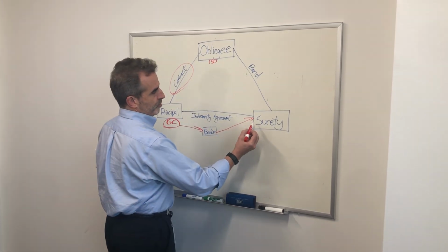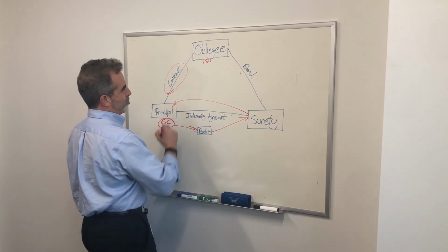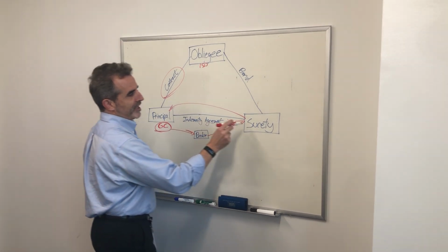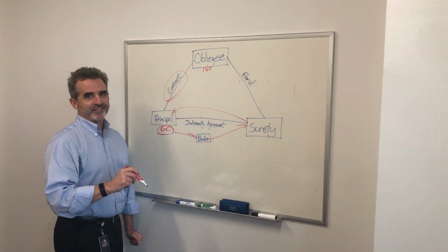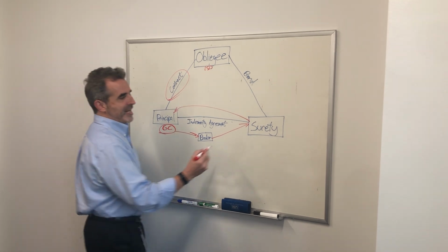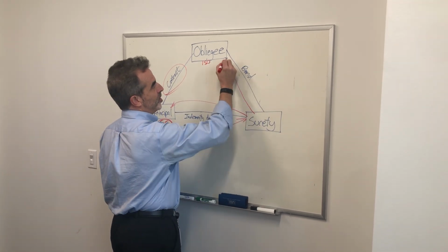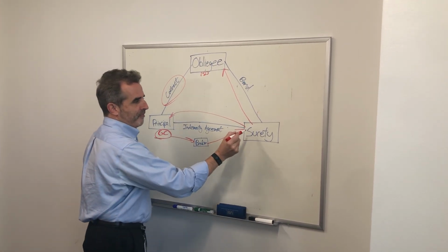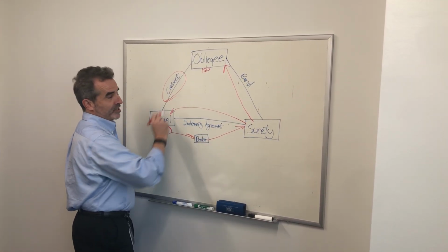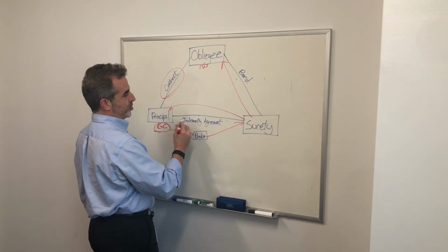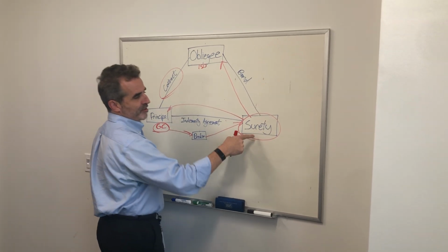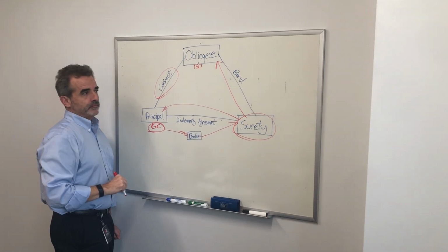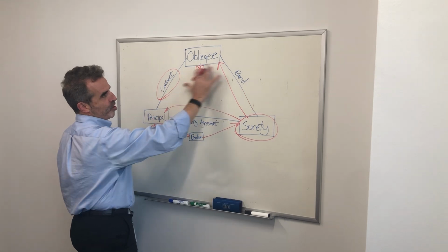What they are going to do is work with your client, dig through their financials, and say, okay, we have looked at their financials, their working process, their debt ratios. We, the surety underwriter, are telling you, Mr. Independent School District, we are going to financially guarantee this project will be done on time. And so as a result, this is the third party that's guaranteeing to the owner the project will be done. That's seen as a three-party contract.